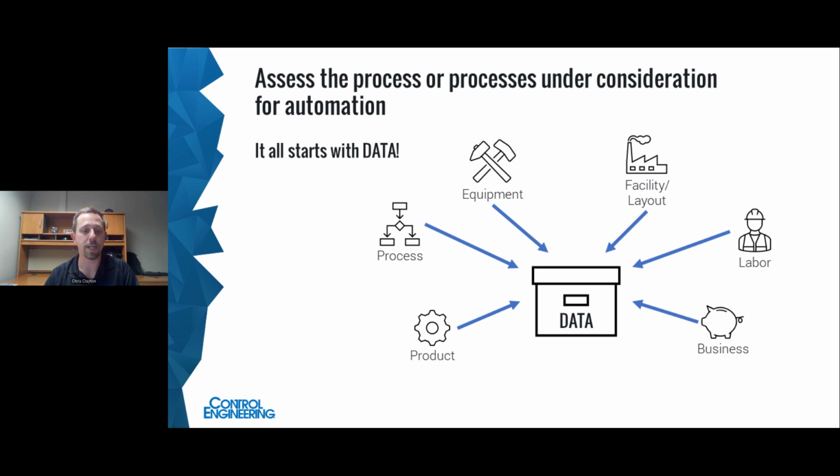So part of the assessment process is what I like to call drinking from a fire hose. It usually involves learning more about the process of making things than I ever thought I'd learn. And really the goal there is to try to learn as much about a customer's process and product as possible in order to identify the best potential applications for automation. This typically requires a facility visit, a few days, keyed completely around data collection. It means collecting days of video, talking to everybody from production managers to maintenance technicians, operators and engineers. We pull in sales, IT, safety teams. We get our hands dirty. We touch the product.